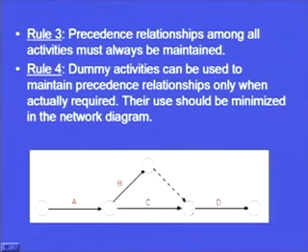So, use of this dummy activity has given us this point or this event at which B is completed and E can very easily start from here in this direction. So, in this way we can say, and we have incorporated the logical precedence that E is dependent on B and D is dependent on both B and C. So, in this way the precedence has been established and dummy activity has been used in order to incorporate this logic or the precedence relationship into the network.